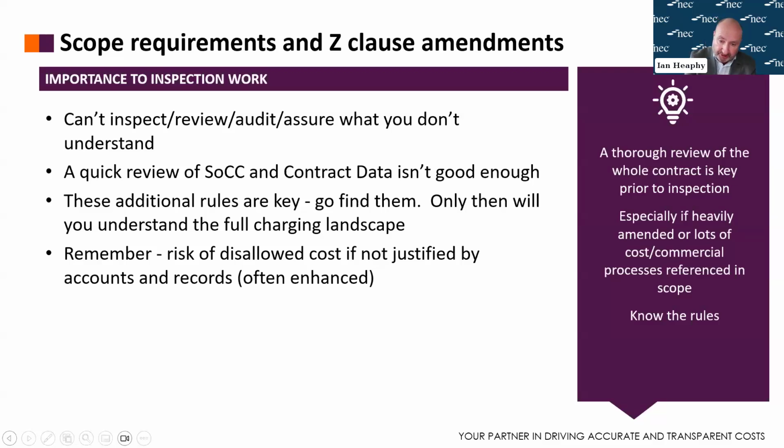You should have set up at the start what information you need to see. You need to look at that. Is the evidence there? Sometimes it may be that certain costs are centrally allocated and then pro-rated out. But if you know that cost is incurred on your job, there's a reasonable audit trail to follow it to source, then that may be sufficient.